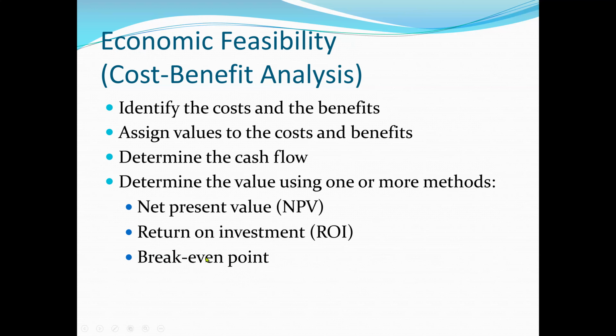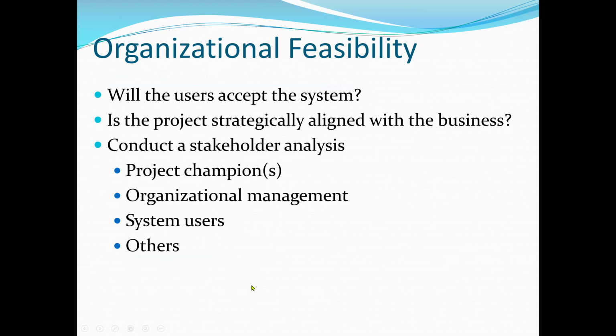How long will it take for the company to recover its $10 million? That will be the break-even point, when the cost and the revenue are equal. It may take 10 years, it may take 20 years, but we need to consider that also.